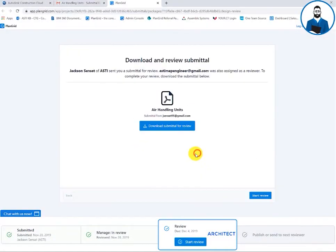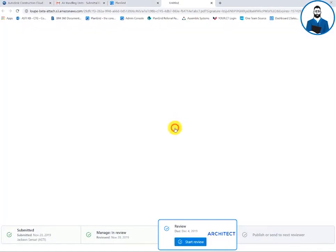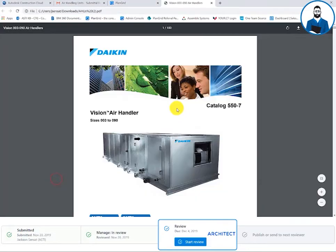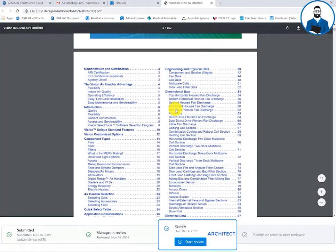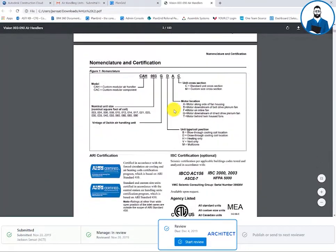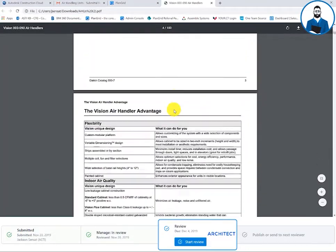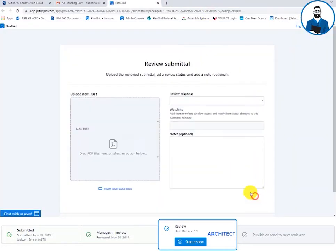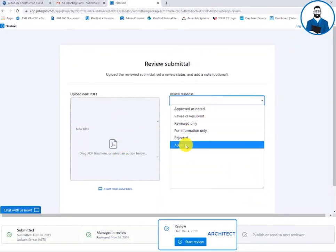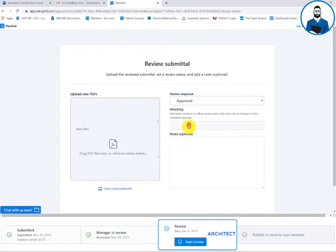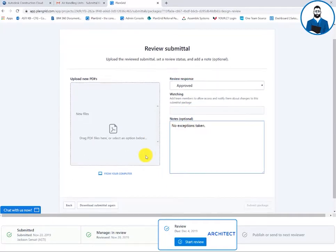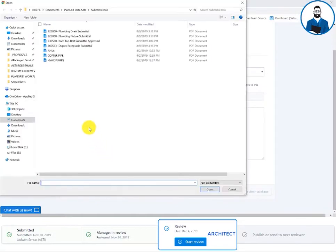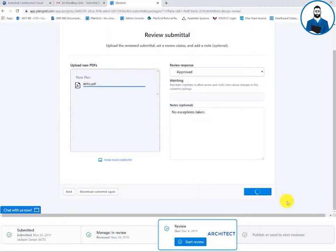Once the submittal has been sent on for review, the reviewer will receive an automatic email and be able to review the submittal without going into PlanGrid. I have no exceptions. This can get sent back to the engineer. The reviewer can choose from a variety of different responses, upload a new PDF with their markups on the submittal, as well as add any additional notes.